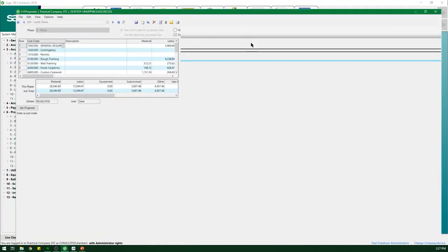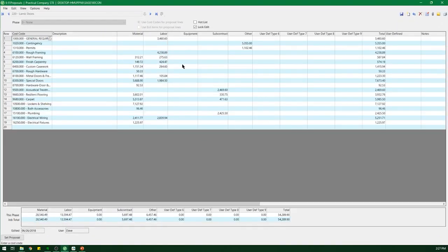Again, this is at a cost code level. This now can become my schedule of values. I can export this out and import it directly into my progress billing, and it allows me to not recreate the wheel again. Since I know what my proposal is going to be, and I know what it came from in estimating, I really don't have to re-enter everything every time I need it. It lets you push everything through the software a little bit easier.